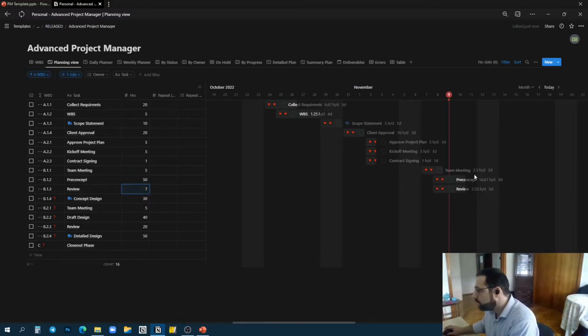So I will just stretch this into 8 days of work, and the same for the review. Now, I don't need to review every single day, but the review process will happen while the pre-concept is developing. So I might come here and say that the review will repeat every 3 days.